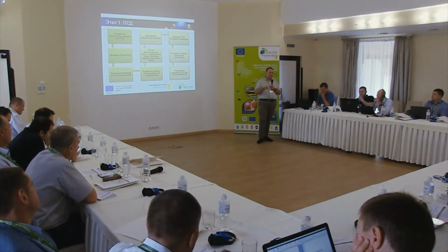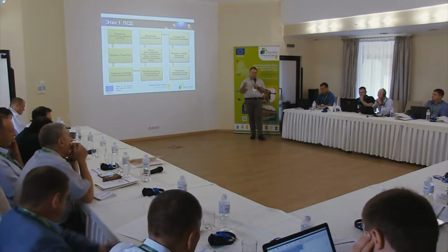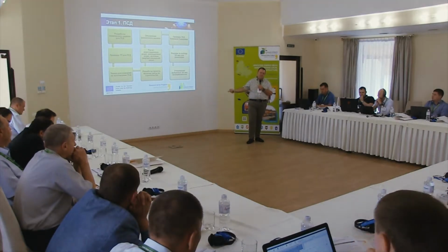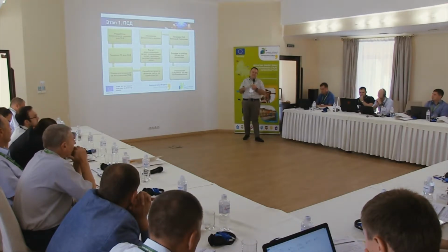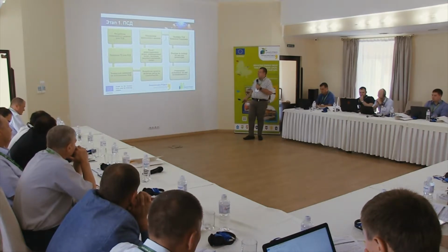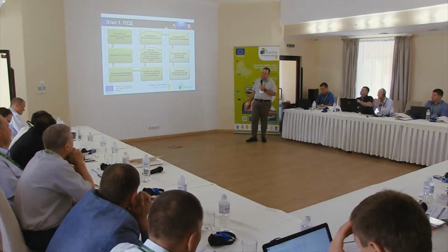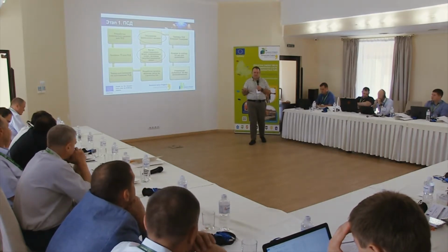For example, out of 3 sites included into the application, for the first year they have taken 2 sites, and on the basis of calculations and estimates and evaluations of budgets for this or that site, it is possible to plan further implementation of the project. Will you have enough funds for all the sites, or do you have to introduce some changes, for example, for the 3rd site included into the project? So this is one of the ways out in case you really do not have enough funds.